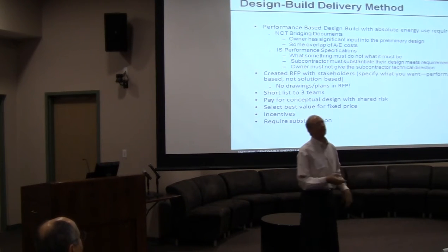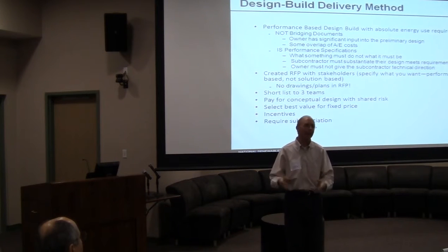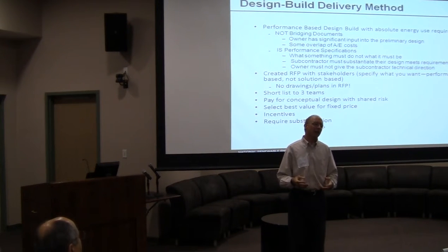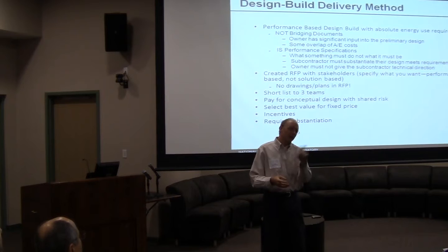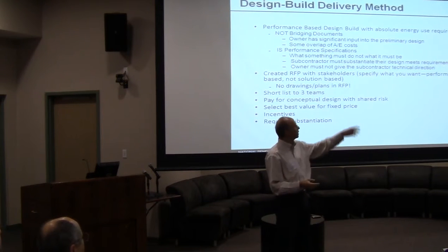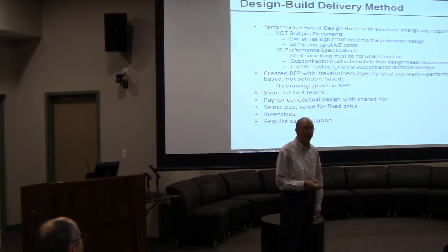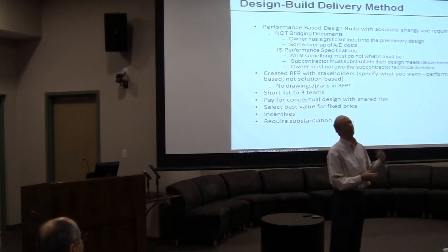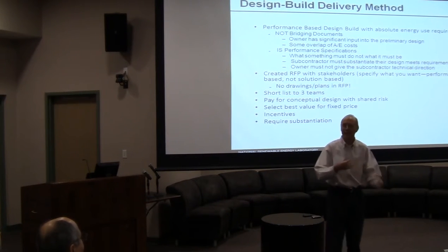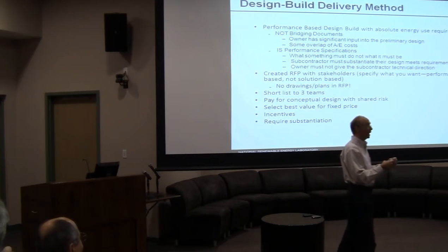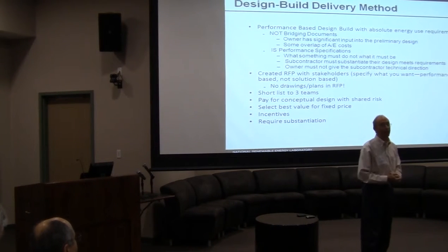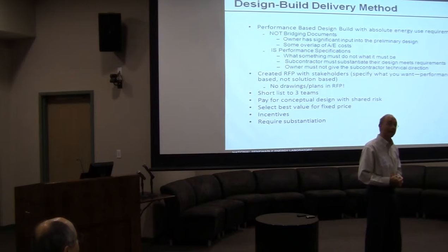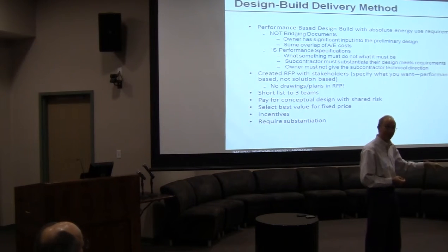And we'd have to go back to the plans and look at the plans, and they said, well, the architect only drew the squiggly line halfway down the wall, so we only put the insulation halfway down the wall. We're like, oh, no, that's just a representation of how you're supposed to put an insulation. Right? And then you get into this battle. And they say, well, we didn't bid that. It's going to cost you money to get insulation in that whole wall.